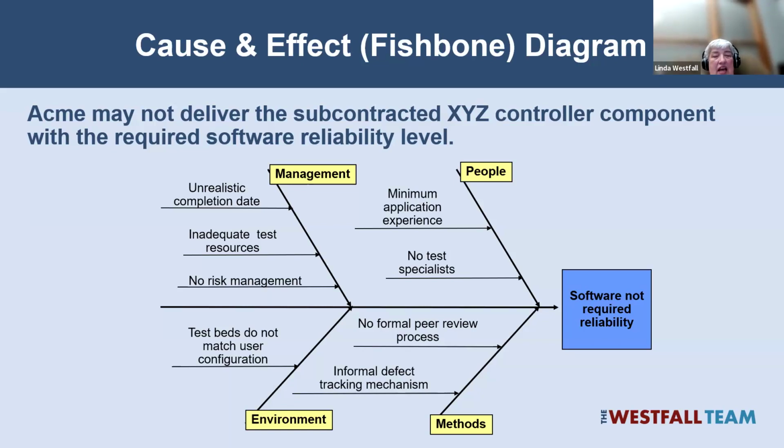Of course, you can use any other analysis technique. The gentleman mentioned failure modes effects analysis, and you can potentially use that to determine, again, the probability that the failure occurs, the loss if it does. If you think there's only one cause for this potential risk, you can just use a 5 whys method. So there's multiple methods for looking at these analyses to determine the context of the risk.